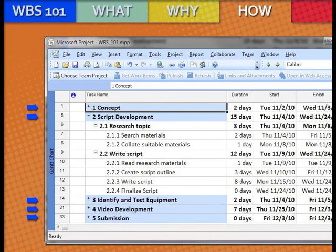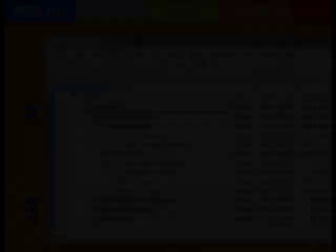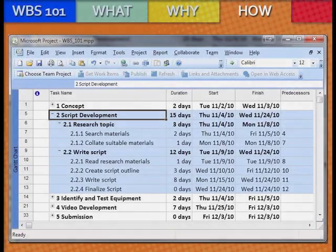Let's now further examine the Script Development task. This task has a 15-day duration. It is composed of two summary tasks: Research Topic and Write Script. All summary tasks have duration dates decomposed from within their assigned task. For example, Research Topic took three days to complete, leaving 12 days to write the script based on the information gathered.